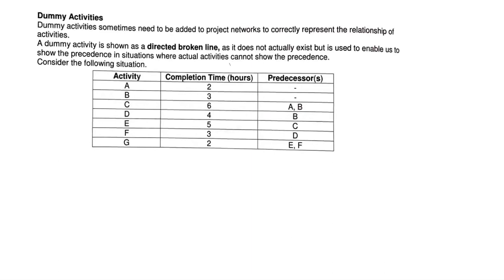Okay, so this is a different one. This time round, the information's being presented in a different way. Couple of things to note. If there's nothing here in the preceders or the precedents or the things that come first, then that means they come straight from the start. Okay? Now, this time around, we're going to look at this concept of a thing called dummy activities, because sometimes,